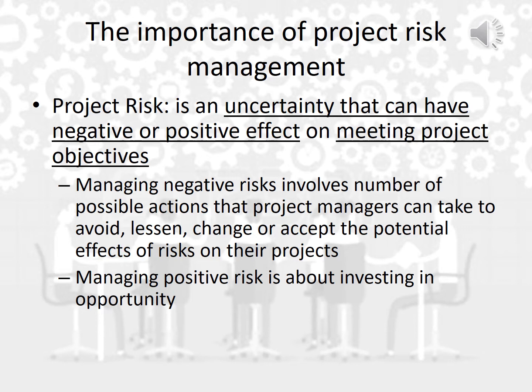So where can I find these uncertain events? I may need to go through the project plan. As you saw during the previous lectures, we have sub-plans related to scope. So I need to focus on the project scope management plan. I need also to look at the cost plan. Maybe uncertain events can occur. Also, I need to know the schedule plan that's related to such a project.